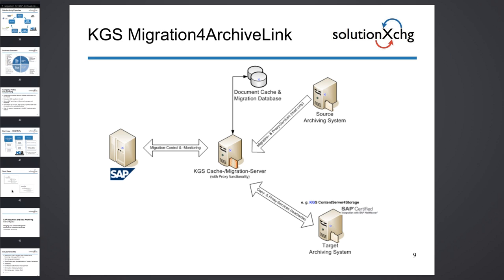A good question. We have done this in almost all possible scenarios. We have had migration projects where we pretty much supplied the tool, the cache migration server with proxy functionality, and trained an archive administrator for a couple of days, 2, 3, 4 days, and then just went into standby mode and were available for questions throughout the term of the migration, and everything was done by the customer.